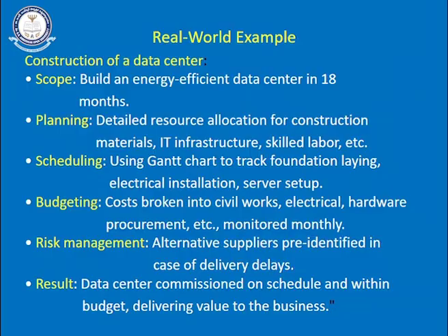For that we need to use some best practices like clearly defining our objectives, clearly planning our project, clearly executing our project, and preparing a detailed report about the project work, and breaking the complete project into small activities. For each small activity we need to plan very carefully, and use realistic times to complete these smaller activities. Here we need to understand the realistic time very carefully. How do we understand it? We need to take judgment from expert opinion. What is the given task, and earlier a similar kind of task may have been performed by people, how much time they have taken and how much time is required to complete this particular task, we also need to understand.